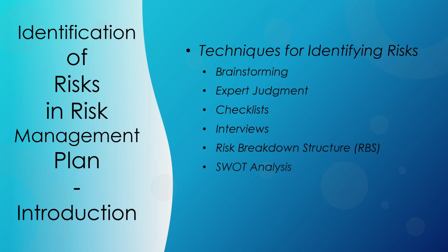SWOT analysis involves assessing the project's strengths, weaknesses, opportunities, and threats. This technique helps identify risks by examining both internal and external factors that could impact the project. SWOT analysis is valuable for exploring broader risk areas and uncovering opportunities that might arise from risks.